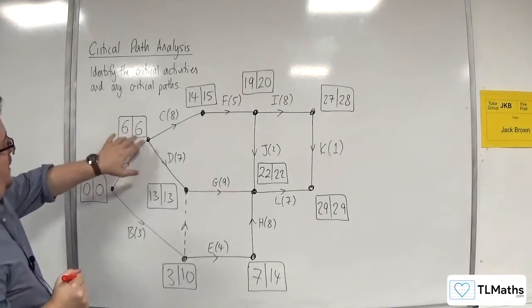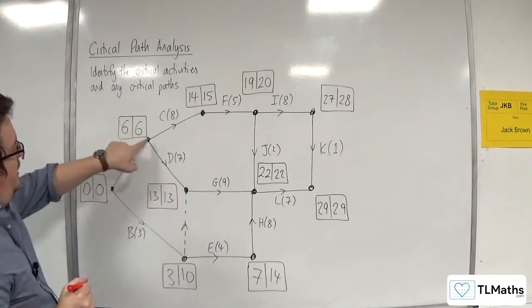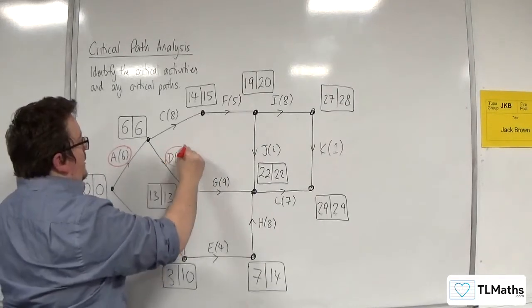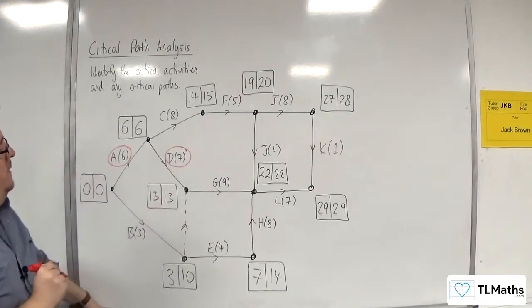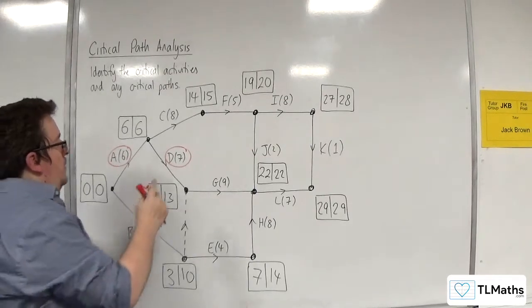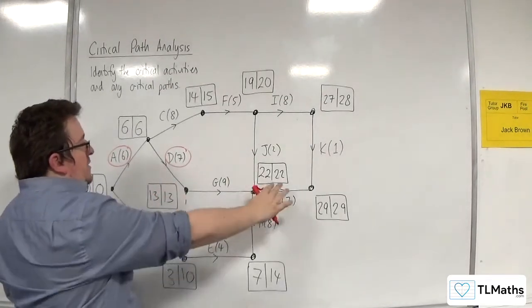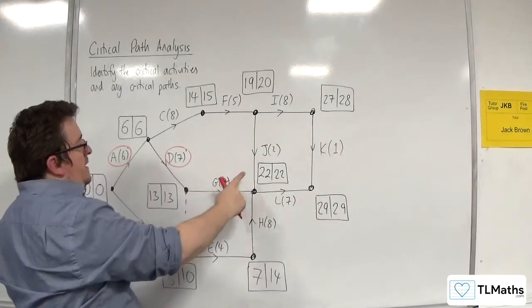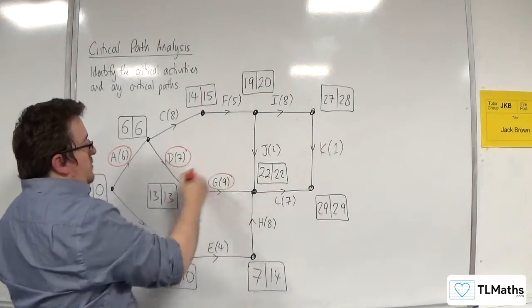Then we've got 6, 6 and 13, 13. 6 plus 7 is 13, so D is also critical. Then you've got 13, 13, 22, 22. 13 plus 9 is 22, so G is critical.